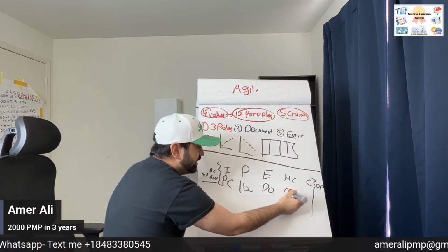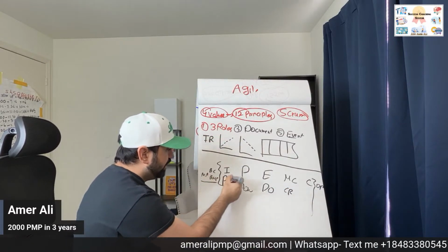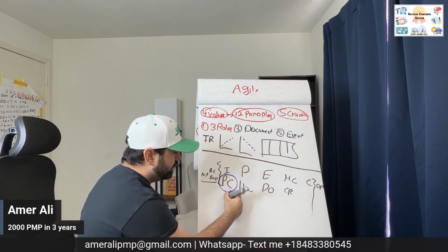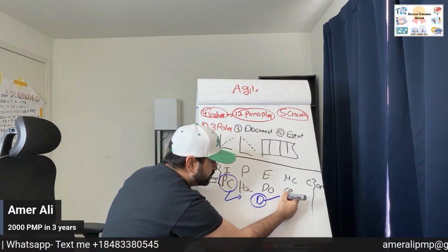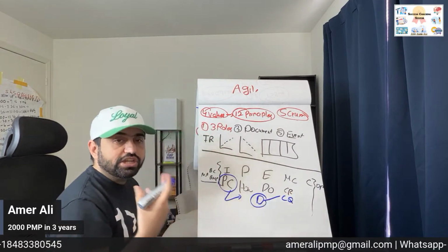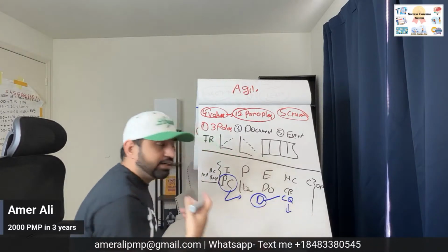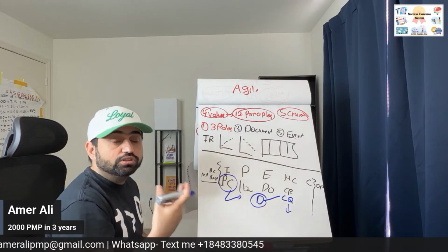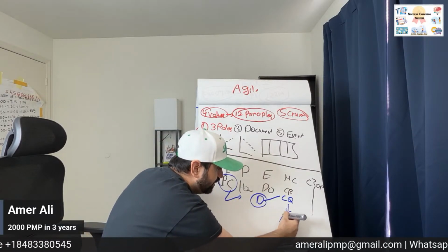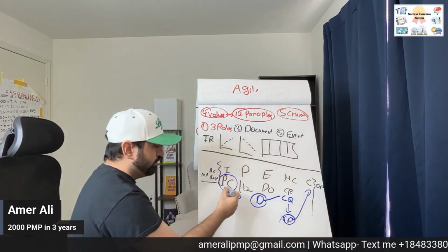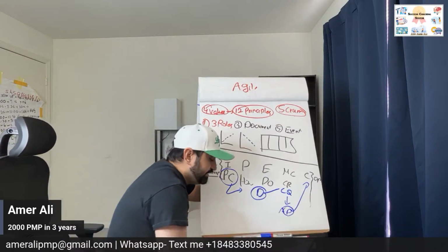Let's say I put it in the form of a deliverable journey. Here the project charter says, okay, you can work on that. Here we make a plan how to do it. Here the deliverable is produced. The deliverable goes to quality control. Quality control checks and verifies if the deliverable is good. It goes to the client. The client checks it against acceptance criteria or the scope baseline. They accept the deliverable. You get an accepted or validated deliverable. Those deliverables go into closing. From here to here to here. That is the entire project management for you in less than an hour.